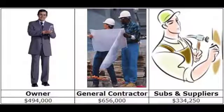This slide shows that the GC has earned $787,200, minus the owner's retainage, which brings it to $656,000. The sub has been paid $177,920 after retainage for a total of $334,250.